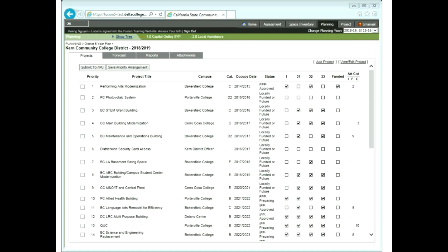There have been a number of times when we've been working with districts who submitted a certain amount of contribution, and as we go through and escalate, they realize that their contribution level moved up from $2 to $4 million during escalation, and they only had the $2 million to contribute. So this will help in some of those situations to give the district the information up front.